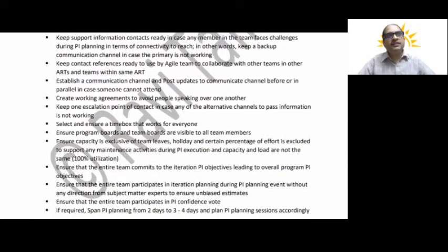Okay. And most important, ensure that you encourage the team members to participate, because this is a team effort. In PA planning, the team members give the estimation, not the SMEs or the architects. If everyone participates, that's the beauty of it. Okay. And ensure that the team participates in the PA confidence vote as well. That's also really very important, because that's where we can sense, since we are not physically seeing each other, but this is one of the really important activities.